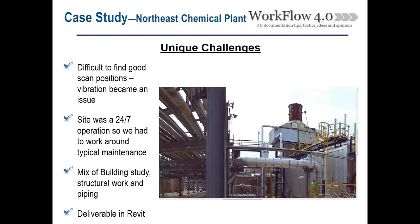They also had to deal with a 24/7 chemical plant site — it's very difficult to shut down an area because they have a product to deliver. There were times when trucks would pull in, areas had to be roped off that couldn't be accessed, requiring breaks or time spent on modeling and registration. Those kinds of things are very hard to account for when estimating a project. The client always wants to cut costs, but you always have to keep a little buffer in there to account for these occurrences.